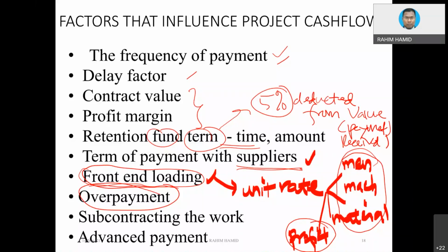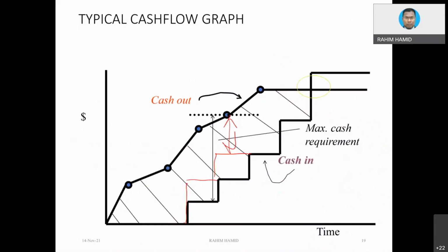It is like you are getting some kind of dividend from your unit trust or whatever stock that you purchased. They will give you an interim dividend. An interim dividend means it is not the finalized dividend. They could finalize later on, when you might receive a few more percent of the balance in order to make the final adjustment. So in order to get overpayment, you have to overclaim. If they accept your claim, then you are going to have extra cash that you can turn around.